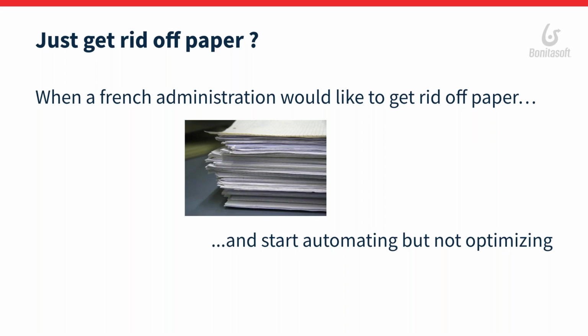But in the end, the departments were sometimes doing things twice, because they had not thought about the change it would imply to automate with a tool and not use paper, where people before were just going to the next desk and saying, can you help me and sign this document, please, so that I can go on and do my next task. So if you don't think before and you don't analyze, maybe you can do things that are totally useless on your project.